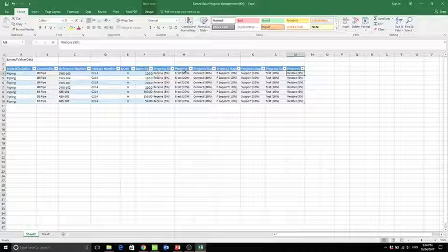You get a further 20% once it's erected, a further 30% once it's connected, until it's finally tested and restored. You receive 100% for that component. That is multiplied by the budgeted units, which calculates your overall earned value. That's outside the scope of this video, but there's lots of information on that.